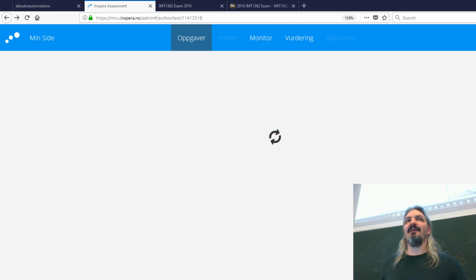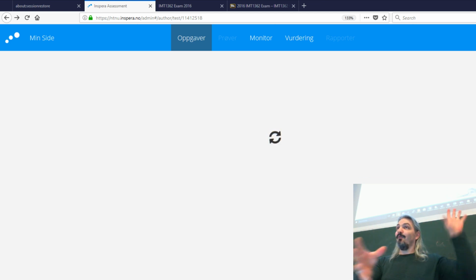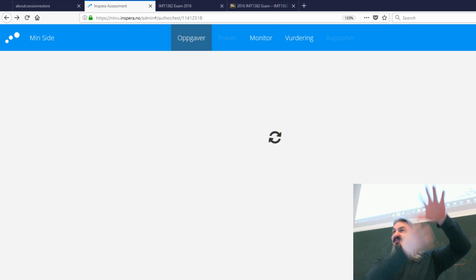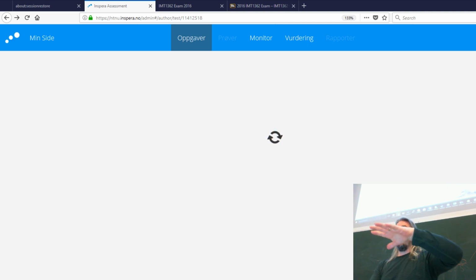Right? So for you guys, the idea of the 2-week block for a sprint: if you were doing shorter sprints, say 2-day or 3-day sprints, you would do work for a few days and then say, right, we're going to look at what we achieved. Did we complete everything we thought we were going to be able to do? If we didn't, let's replan anything that came up. We'll put it into the log of things that need to be done, and then we'll look at it again and say, right, now what do we think is important?